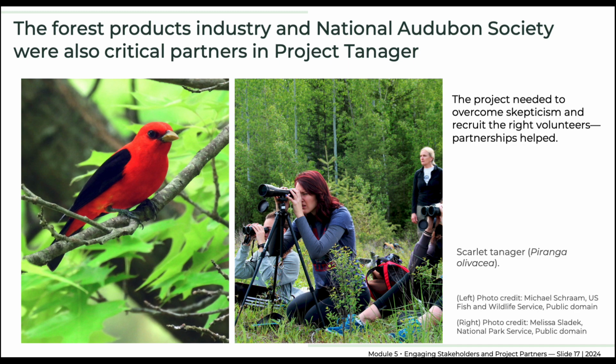At the time, researchers and organizers were just beginning to discover participants' ability to collect quality data, and Project Tanager employed fairly complex observation protocols. To head off critics, the organizers involved them, informing professional ornithologists about the project and its results through news releases and presentations at meetings of professional organizations such as the American Ornithologists Union.